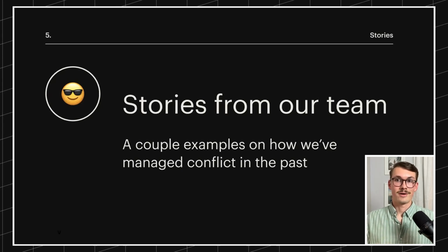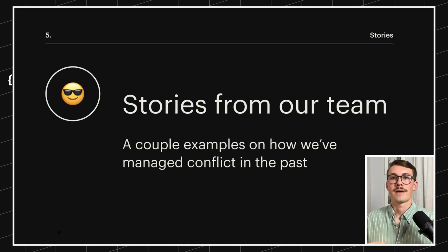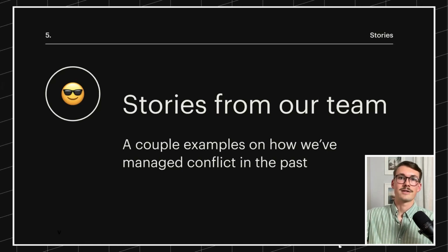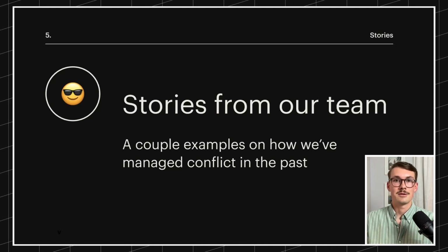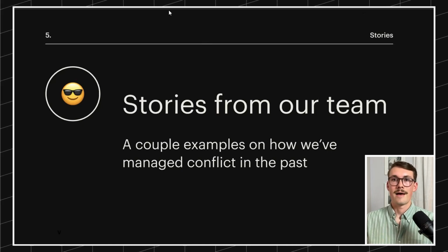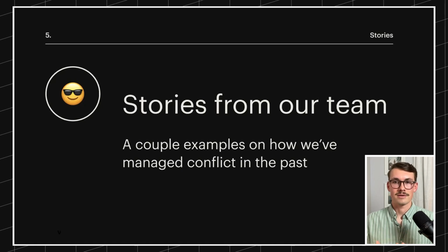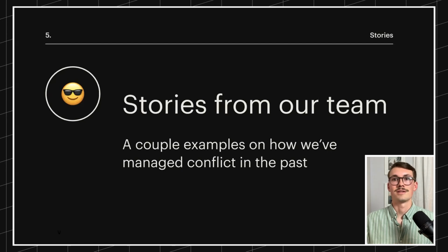One week before the website was scheduled to go live, our Finsweet developer had a call with the client and found out that there were an additional 38 pages, on top of those 17 pages, on the old website that needed to be built in this new website. So this was the first we were hearing of it. And it would be using new components, which were in this new design. The client was adamant that it all needed to happen before going live, and the dev came back to Maggie in this case with that information, asking what to do next.